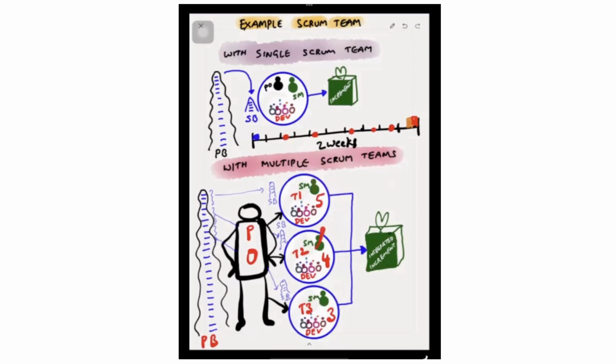Similarly, team 2 has something with team 3, team 1 has something with team 3, or teams 1, 2, and 3 have a dependency together, like that throughout the sprint. Using continuous integration at regular intervals is a good idea, so that there is more probability of creating an integrated increment by the end of the sprint. So that is a better thing.